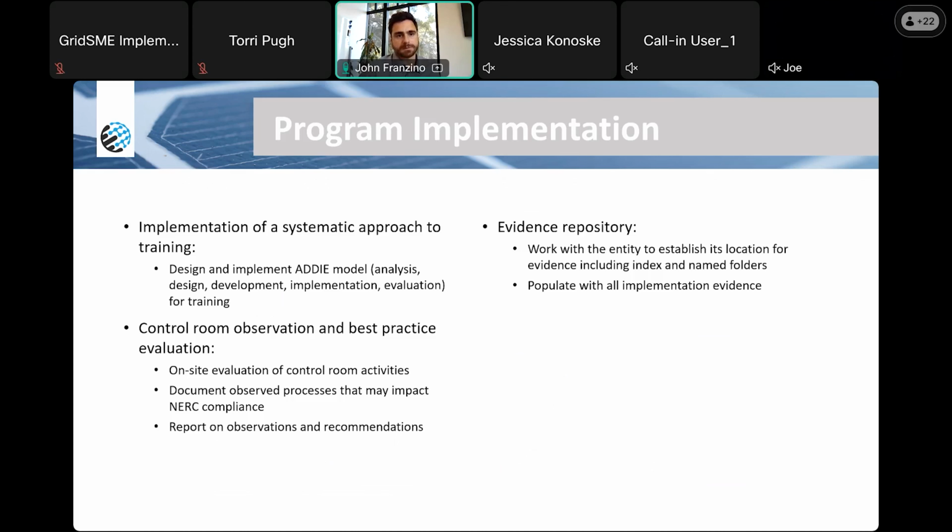Depending on the requirement type, that may just mean having the program in place. That may mean having that policy program in place and training on it. In other requirements, that may mean all of that plus actual technical evidence to support the implementation of that policy or procedure. But making sure that you can demonstrate compliance on day one is super important, and then have the right plan and program to maintain evidence and organization, again, over that 6 to 9 year cycle for the first time you're going to be audited.